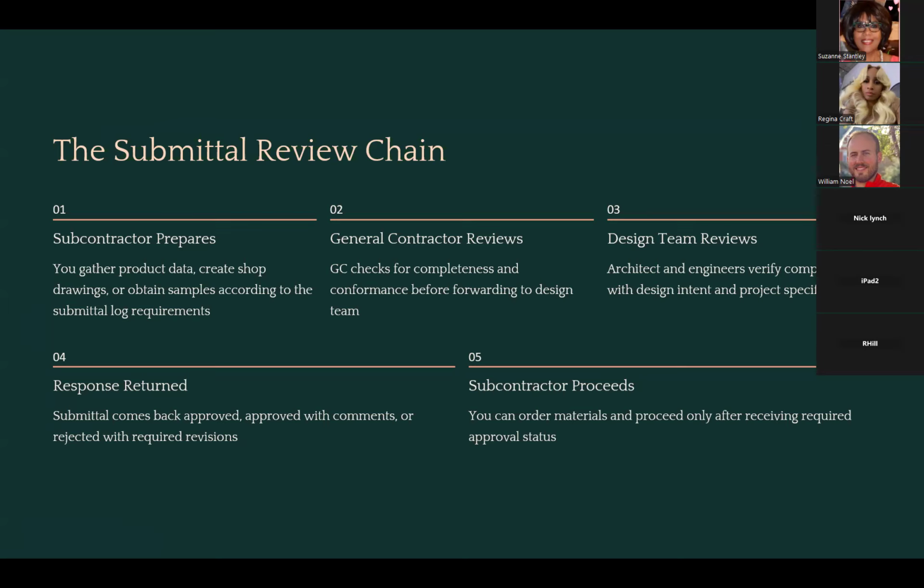Not really huge items in the large scale of a big commercial building, but it may take 6 to 8 plus weeks to get an approval on that, and you have to factor that in before, like I said, you have to have that approved before you buy it, and the lead time on that material may be another 6 weeks, depending on just a lot of different factors.